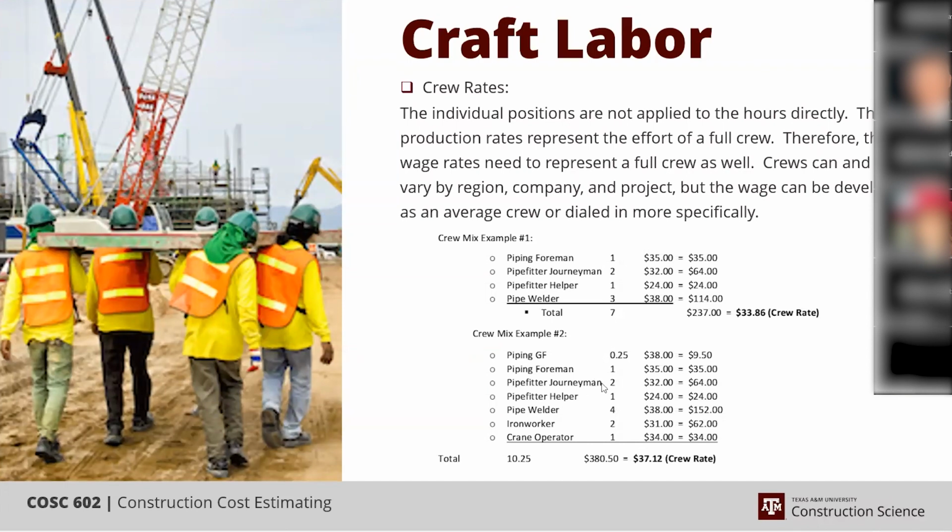So what you're trying to track here is the hours associated, the cost. In other words, the cost to complete that work. Is that correct? Exactly. So beforehand we had an activity, 100 tons of steel, and our U.S. Gulf Coast book rate says that's 30 hours per ton, which gives us 3,000 hours. Then we add our connections in there, and we get to 3,240.